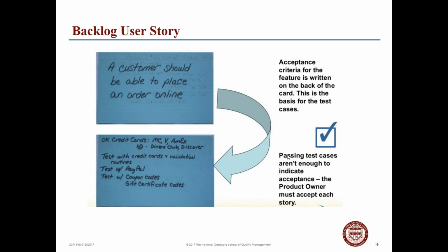So looking at what we're looking to do and what we need to do, we must accept each story. Passing test cases is just not enough to indicate acceptance. The owner of this must accept each story.